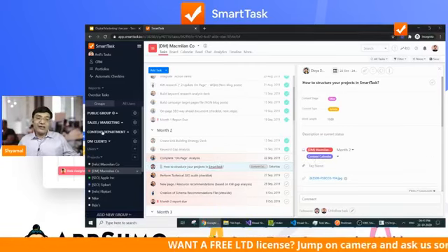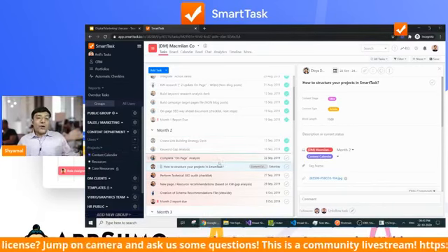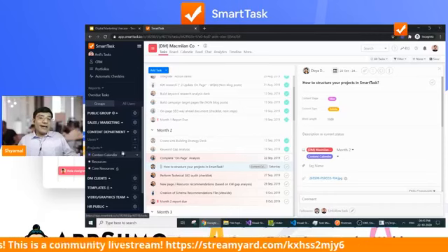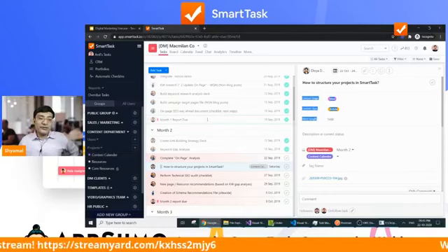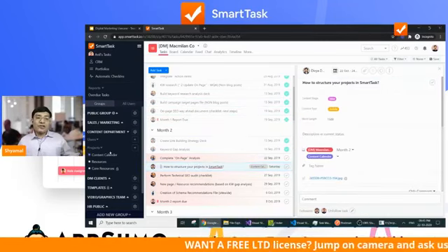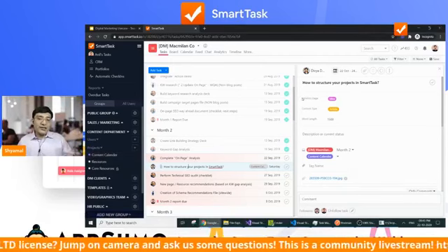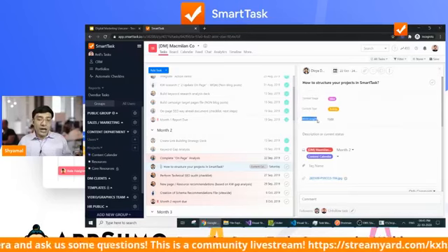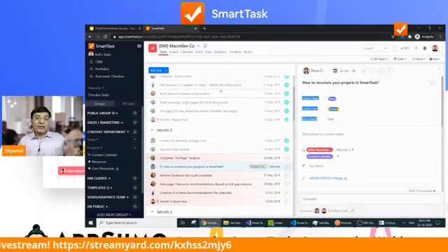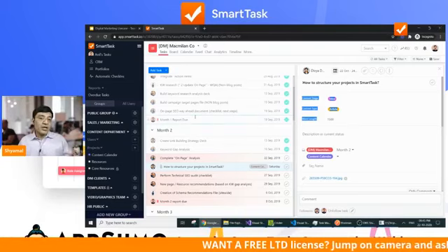Now the content calendar is within the content team, so you can see the content department is there, and then you have the content calendar. So once you create that task, you also share it with the content calendar team. So this task will also reflect in the content calendar. You can see there are some custom fields. Now these custom fields are not there in other tasks. That is because we have included the custom fields at the content calendar level. So all of the tasks in the content calendar will have these custom fields: the content stage, the content type, the number of words to write. All of these details will be there in the content calendar. However, the other tasks within this Macmillan Co project will not have those custom fields.